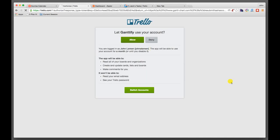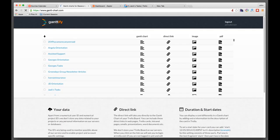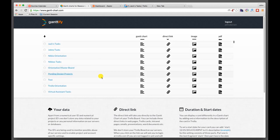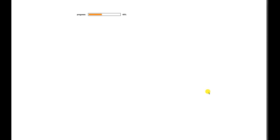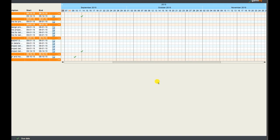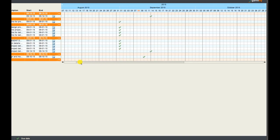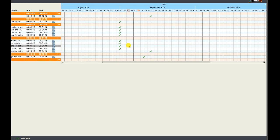I'm going to go ahead and allow access real quick. And it'll take just a minute for it to come back up. And then we will go back to that pending projects and tell it to do a chart again. So, sorry for that little mix-up there. But it'll build it out. And if you, in Trello, define sort of a begin and an end date. I just have due dates right now. So that's why we have sort of these check marks this way. But if you have a beginning and an ending date, then it would have these Gantt chart lines going across.